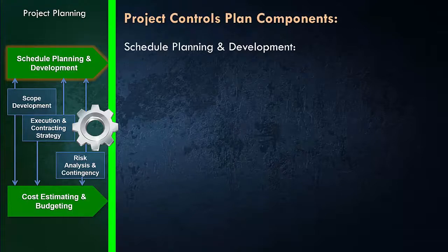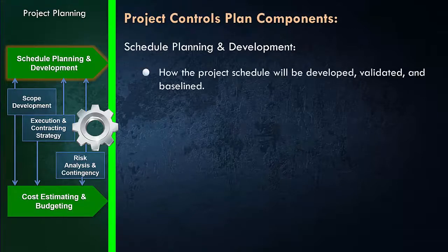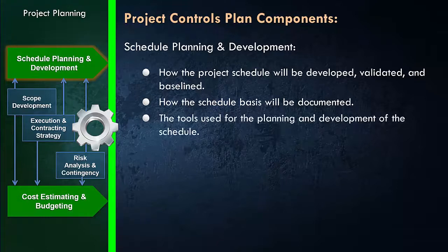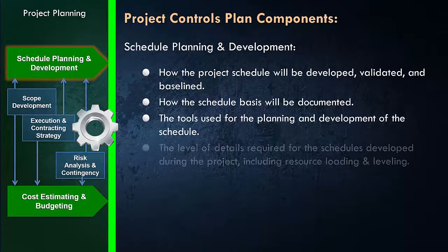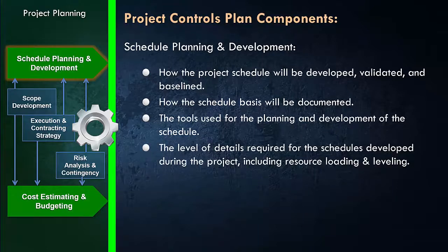So the next point is schedule planning and development. You need to mention how the project schedule is going to be developed, validated, and baselined for this project. How the schedule basis will be documented. Also, what tools you are going to use for planning and development of the schedule. Also, you need to address the level of details that are required for the schedule development during the project, including the resource loading and leveling.